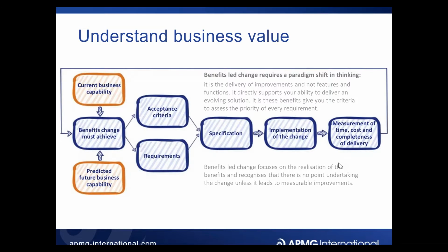The other thing I talked about, we are going to be using lots of techniques where we do things like a benefits breakdown structure, which everybody seems to love. It's like a game of hide and seek, where what we're trying to do is brainstorm every single possible upside and benefit associated with the changes that we're making. We start to think about looking at the scale of that support, the scale of the level of benefits.